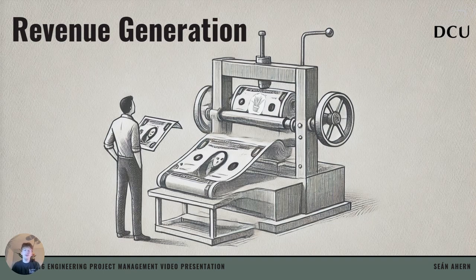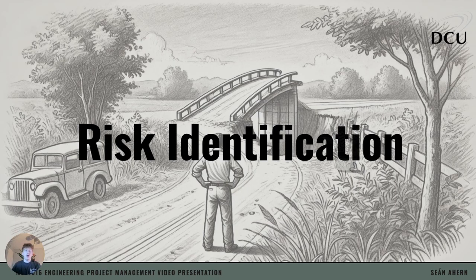With careful cost and revenue planning, risks are inevitable. Let's analyze potential risks. A number of risks could potentially derail the project. These include the high cost of land acquisition, delays in planning permission, challenges in acquiring materials, and the availability of skilled labor. These, along with potentially unforeseen delays or changes in the market price of materials or government policies, could affect funding. Now that we've identified the risks, let's look at strategies to mitigate them.